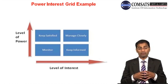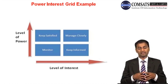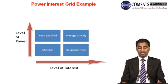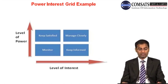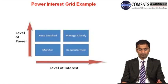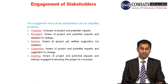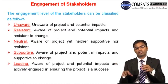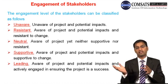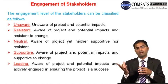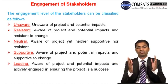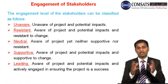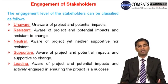One example is the power-interest grid. On the y-axis is level of power, and on the x-axis is level of interest. If a stakeholder's level of interest is high and their level of power is high, you need to manage them very closely. If they have lesser interest and lesser power, you can simply monitor them.